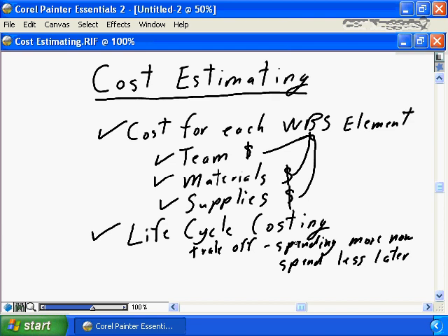If your project involves an element of analysis and design, the widely held belief, and I'm one of those who hold this widely held belief, is if you spend more time, more money during the analysis and design phases, that you're doing a better job of defining the requirements and defining how the requirements will be satisfied, which will result in significantly less spending in the development phase when you actually develop the right thing right the first time, as opposed to getting into enhanced levels of testing or enhanced levels of rework.